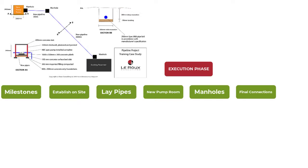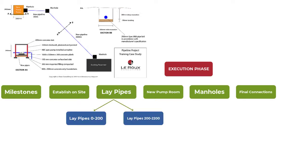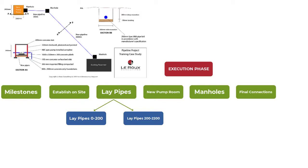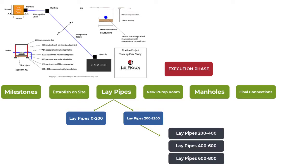Then I've also decided to divide my laying of pipe section on level two into two separate sections. Again, this is from a practical execution standpoint. I know from experience that we can test those pipe sections between manholes. So we have manhole to manhole in that first pipe section zero to 200, and then we've got a manhole to manhole on the second portion there. So that's how we're going to test it and hand it over. That's why I will just divide it on a level three into those two components. And then I will also, for the sake of control and having a better level of detail, I will divide my second pipe section, the 2000 meter section into 200 meter sections, so that it's smaller, so that I have more finish to start links, and that I have better control in my schedule later on.